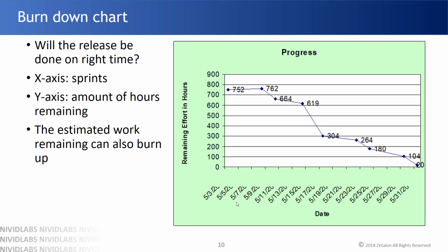Once we have all the backlogs, tracking, and estimation done properly, and productivity is also tracked in the daily Scrum, we will know what we are completing and what is left. Are we reaching the target? We see that by looking at the burn down charts.